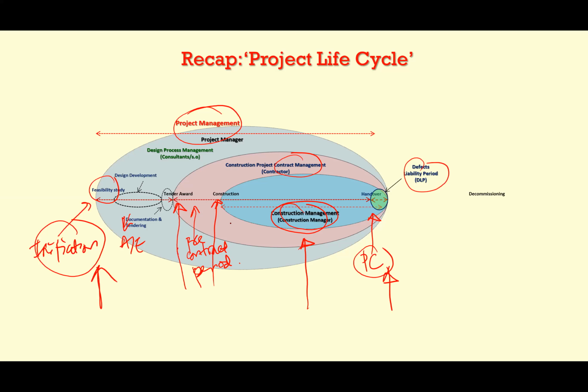Okay, for how many years? Maybe such a development can run for 100 years. And then if you divide that by how many years and then days, at the end of the day, you will get a unit rate, so that we can evaluate which alternative would be more profitable. That is the life cycle costing.